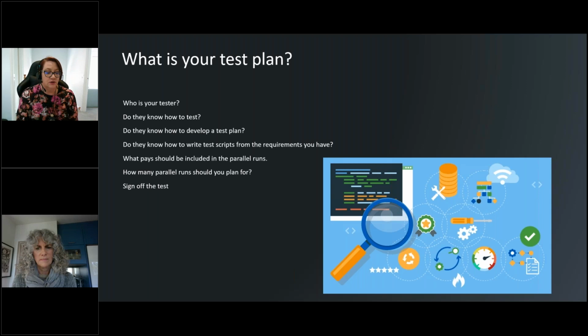Report testing. So I am a big advocate for, instead of spending a lot of time and money customizing reports, actually test what's in the system first and then decide what you need. Because often we are using reports in our legacy systems because they are available. So trying to replicate that exact output is, again, a costly exercise when most payroll systems will have similar reports. They might look and feel slightly differently, but they generally contain the same data. So as part of your testing, you need to actually run the reports and make sure that you get the information you need as a business to keep functioning and keep carrying on.